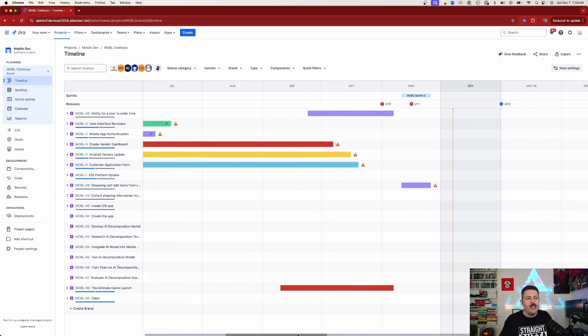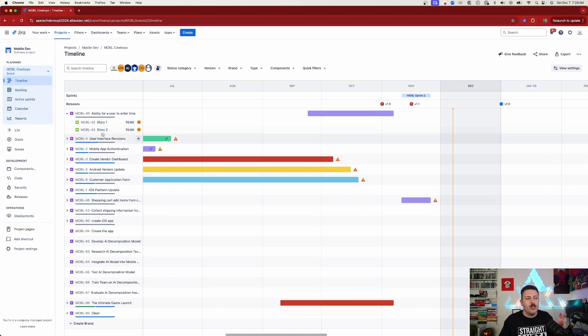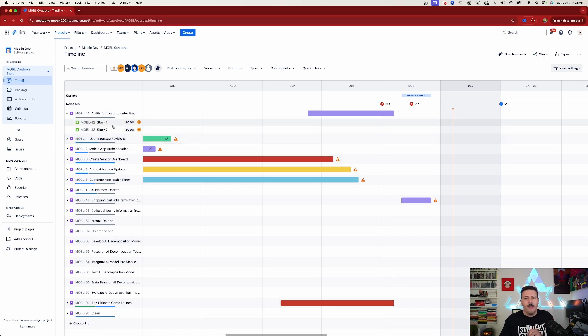The way this works is all your epics are going to show, and then you can decompose your epics into your stories, tasks, or bugs. Unfortunately, in this basic view, that's it — you just get the epic and the story, task, and bug as a child.